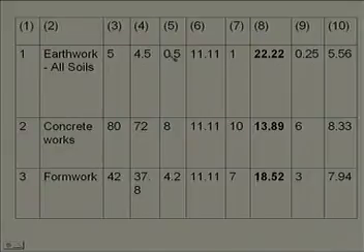So the total markup or margin is 0.5. Now in the first case I have assumed a markup which is uniform. What you find, 11.11 is the markup percentage. In all the activities I have used this 11.11 percentage.